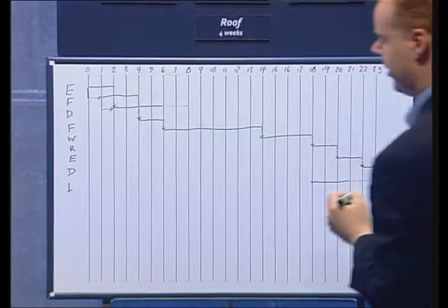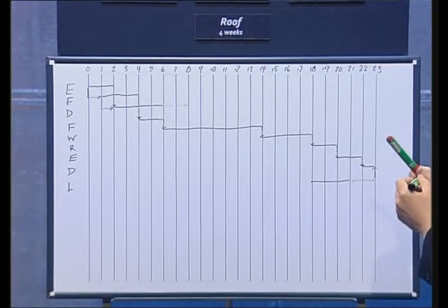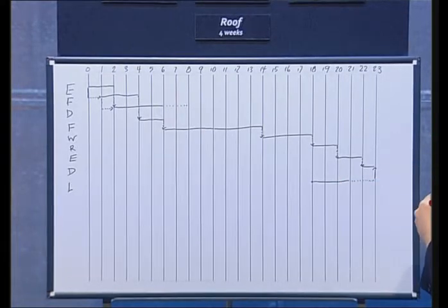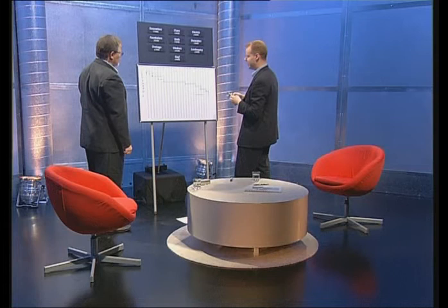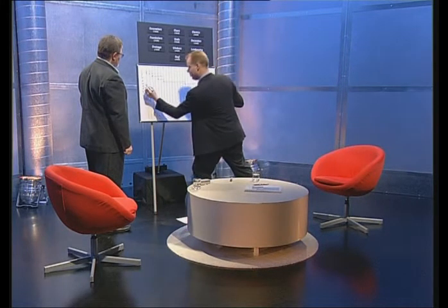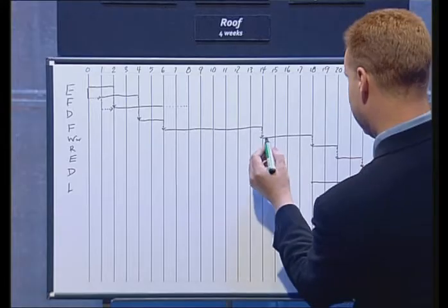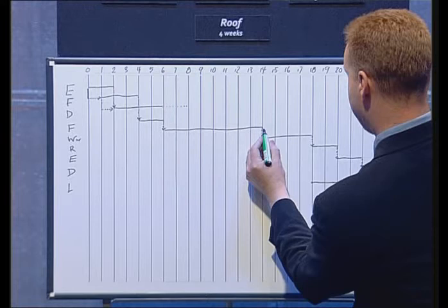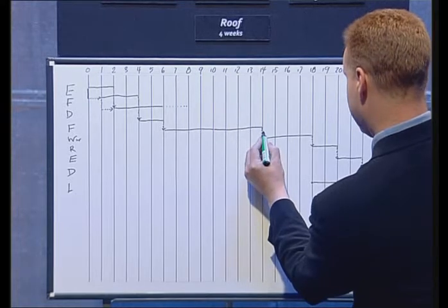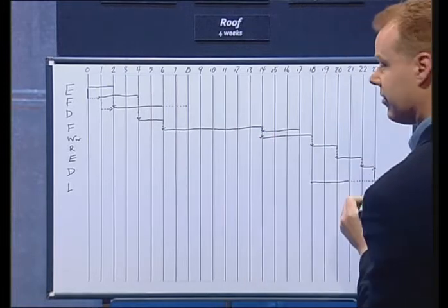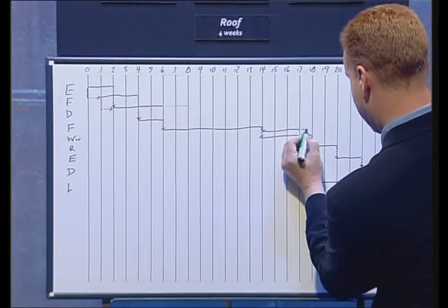So we have the earthworks need to be complete before the drainage starts. Everything else seems to have the right activities in place. So let's just add the windows in right after the walls, 3 weeks. And we can probably run that with the roof. Okay, so we have, again, another activity here. And actually I've got time.